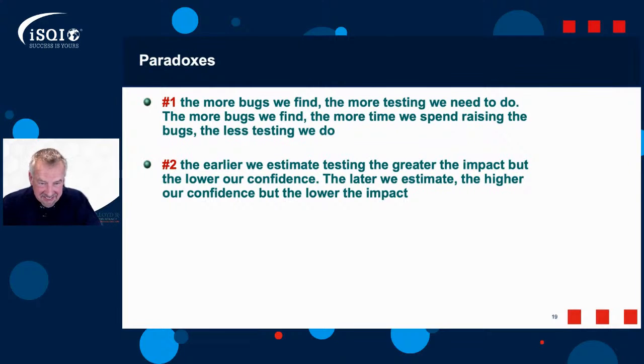The earlier we estimate testing, the greater the impact, but the lower our confidence. The later we estimate, the higher our confidence, but the lower the impact. Okay, let's go back to my trip down to Southampton. I think it's going to take 3 hours. I set off, I put my sat-nav on. The sat-nav tells me there are some roadworks, and it's indicating that it's going to be 3.5 hours. The sat-nav then diverts me to another route, and it cuts it back again.